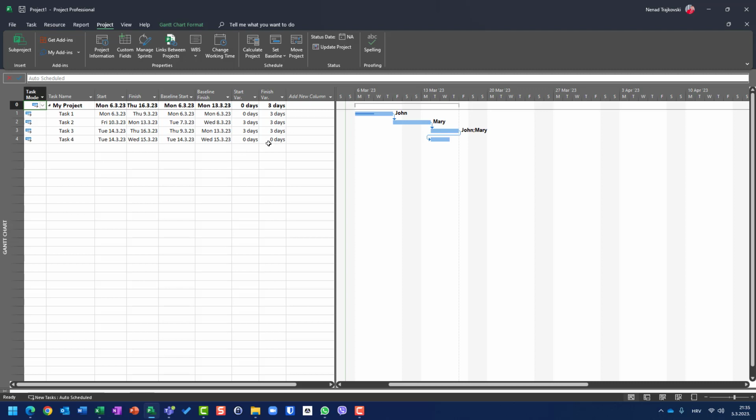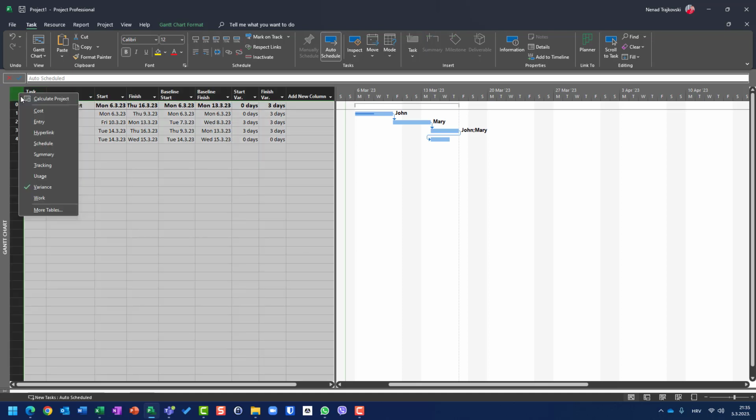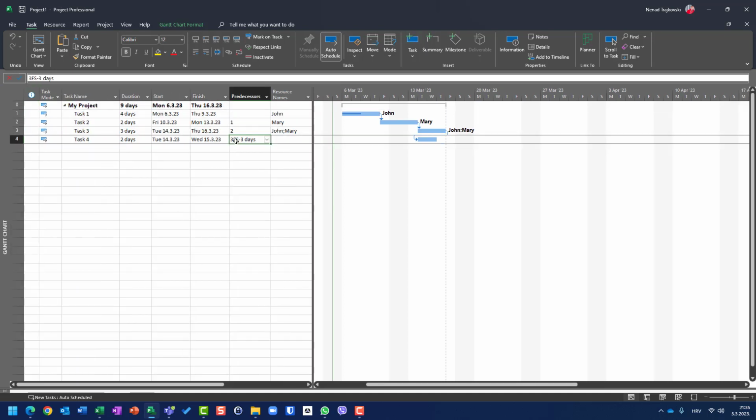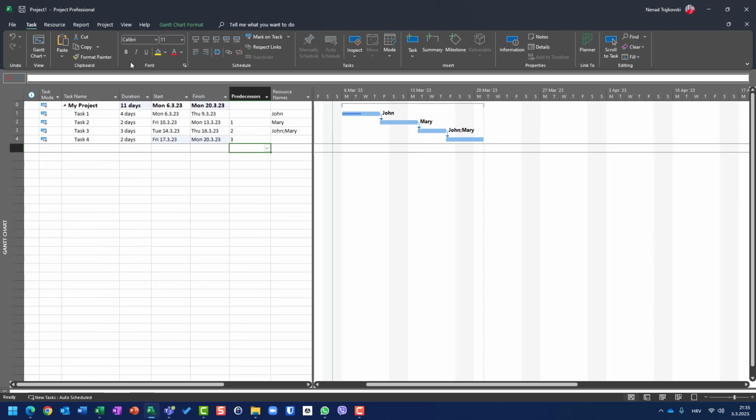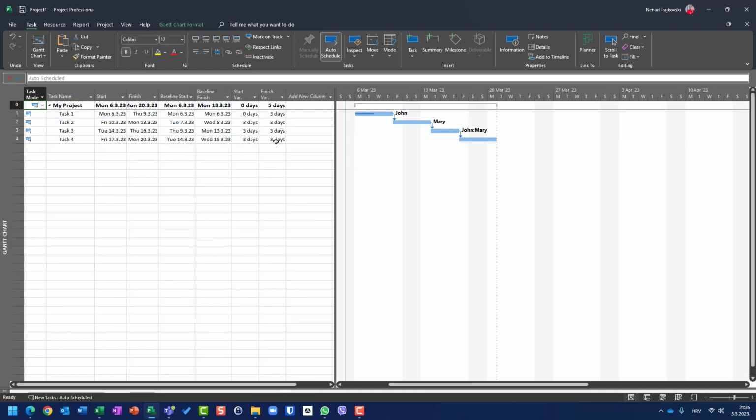But now I'm going to the Gantt chart, and I will say I don't need the lag, I will say 3, okay? Now, if I go to the variance table, I will see that this task has 3 days variance as it is supposed to be. But anyhow, this can be done. But be aware that this is a very simple situation.